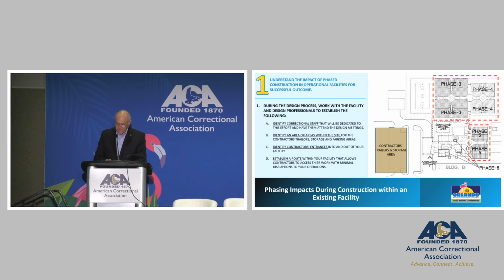Our first topic, again, understand the impact of phased construction and operational facilities for successful outcome. It's always nice if, during the design process, you can work with the facility and the design professionals to establish the following. Identify correctional staff to be dedicated to the project throughout the duration of the project. Identify an area or areas within the site for the contractor to use as their laydown and storage areas. Identify contractors' entrances and exits in and out of the facility. Establish a routine within your facility that allows contractors access in and out of the facilities. These are very important features.